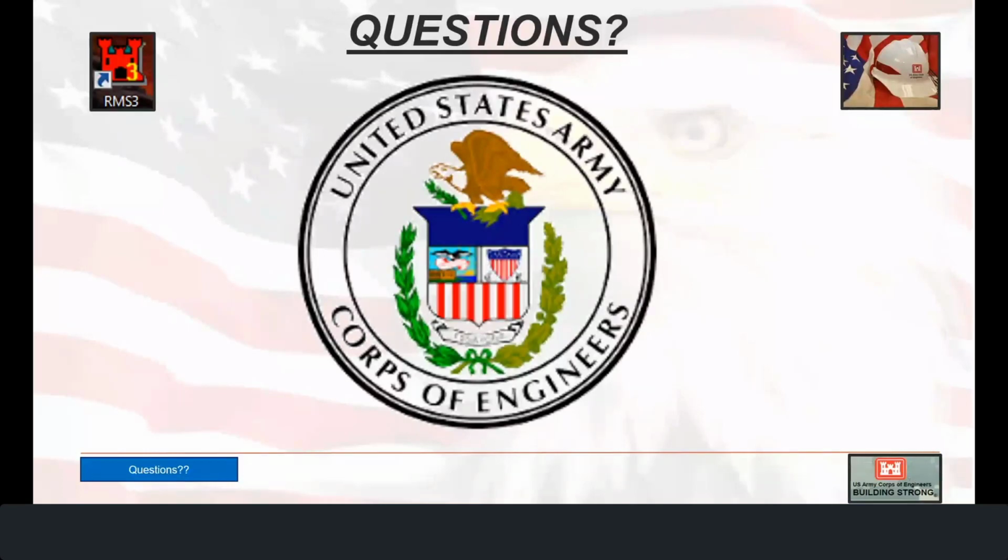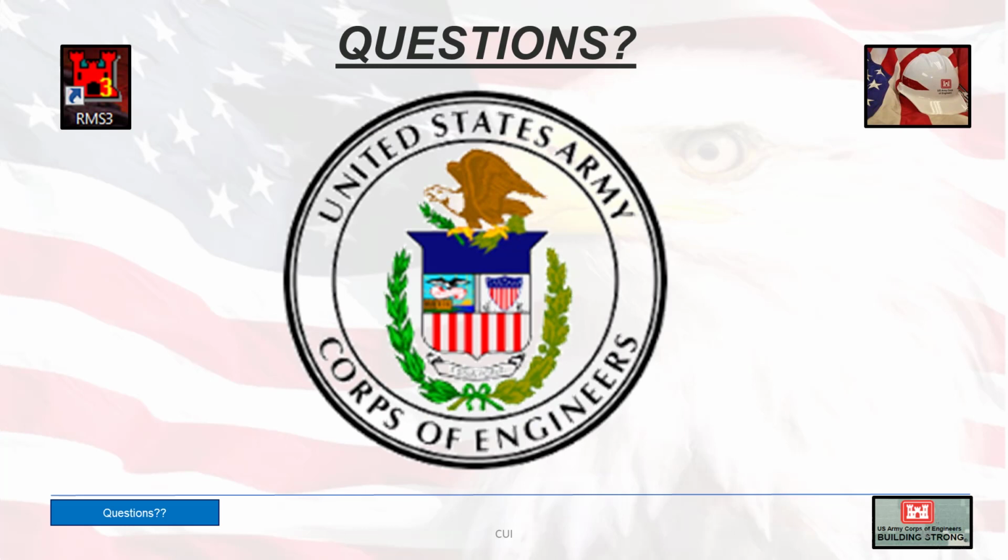Now, Andrea Hinkle from headquarters did comment back and say that they should not be the same person. I just want to make sure I say this right: please note that from a process standpoint, the same person should not be signing as the preparer and approver.